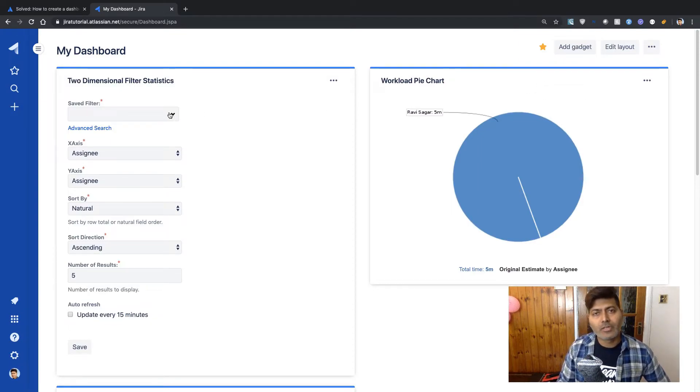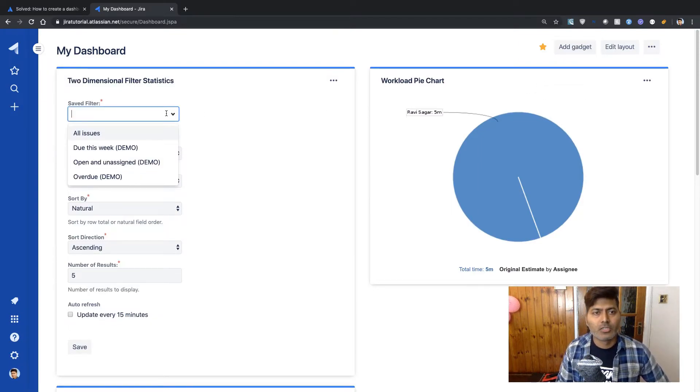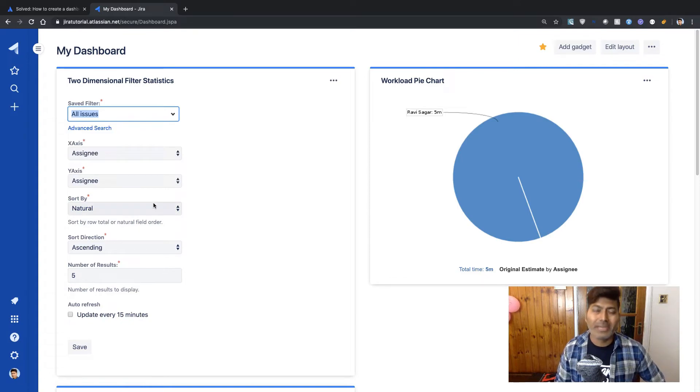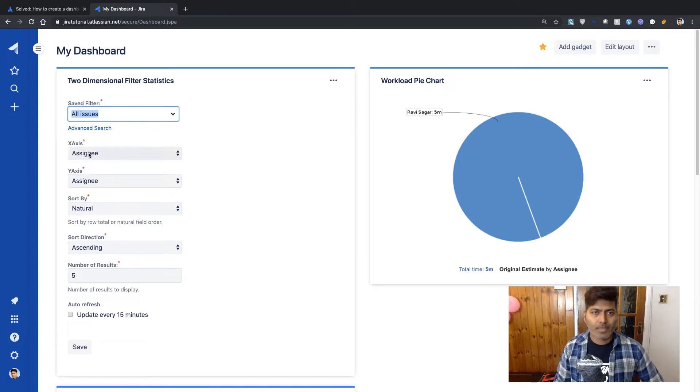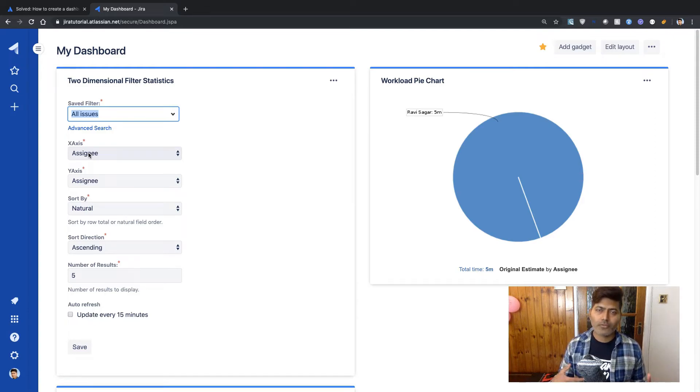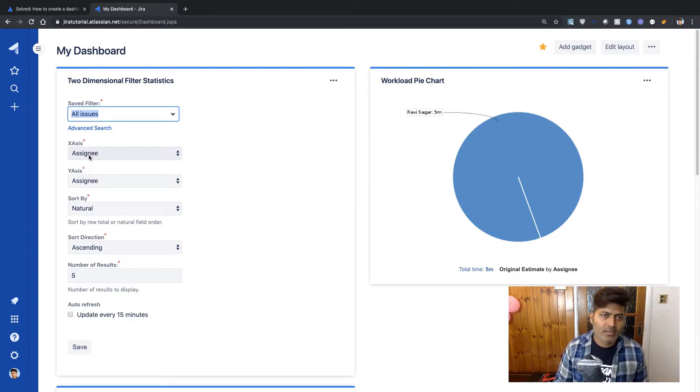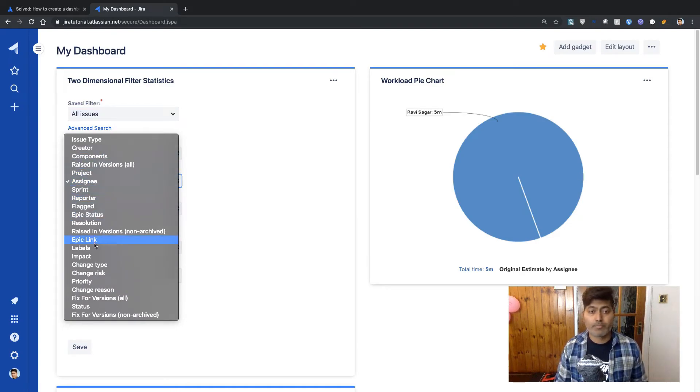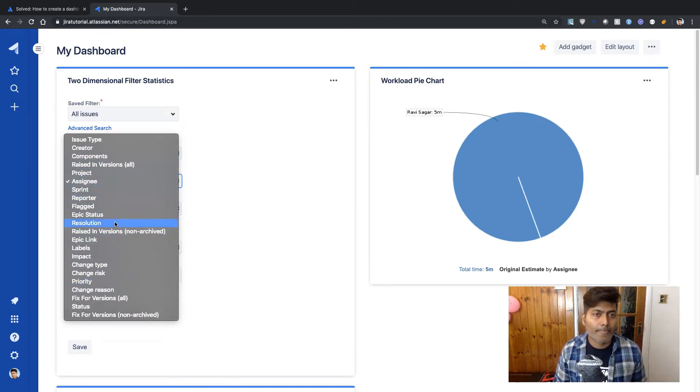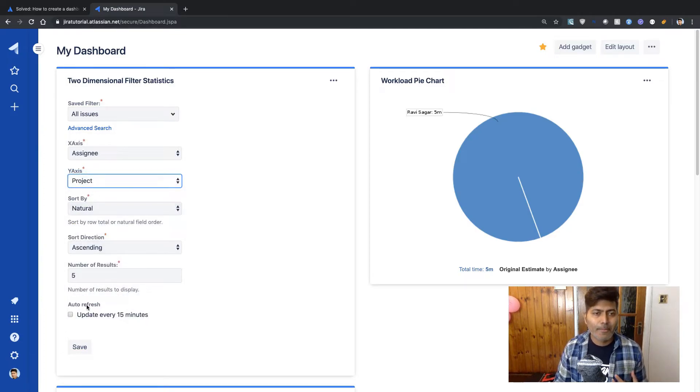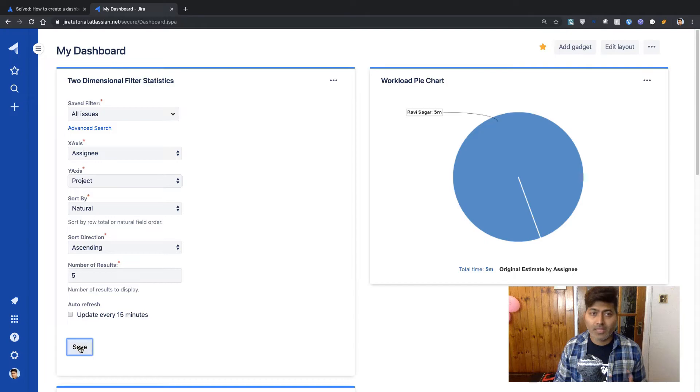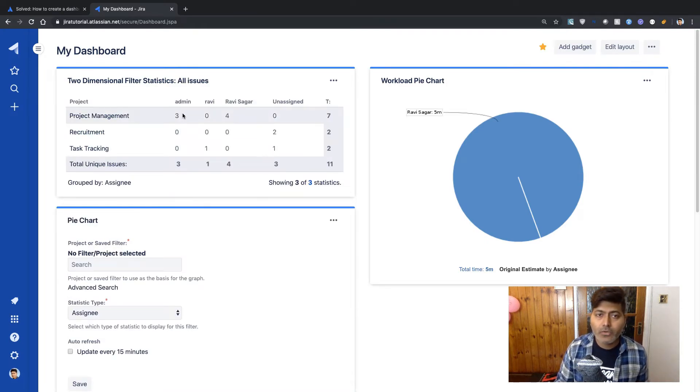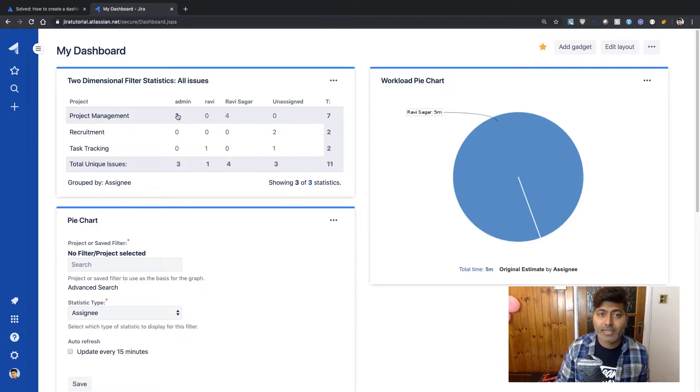But two dimensional filter statistics will show you really interesting information. So on this gadget, you can have two fields. Let us say one is assignee and the other one could be maybe your project. Let us use the project field, project here. And you can simply save it.